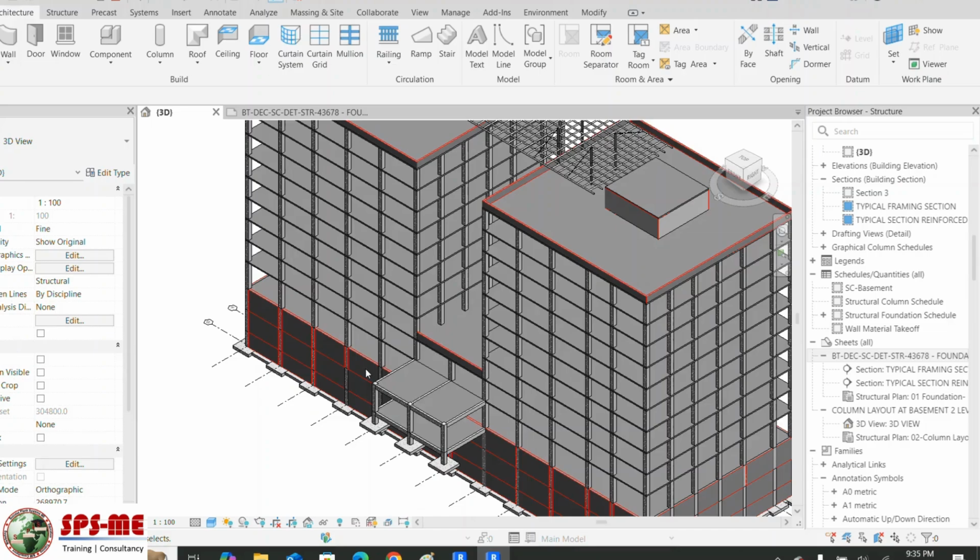You understood, right, what I'm saying? Because basically why they create this Revit BIM model is for coordination purposes. Coordination will be easy, and you can reduce site errors. It's said that 60 to 80% of site errors can be removed when you create a proper BIM model.